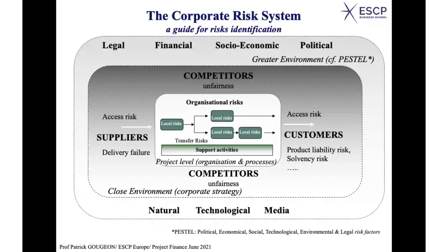Once you have done that, if you go through that with experts who are familiar with the type of activity you develop, you should be able to end up with a list of risks that the company is exposed to, and hence the necessity to identify the priorities, where the most important risks are, to find solutions to avoid the risk, or to transfer the risk at least out of the project company.